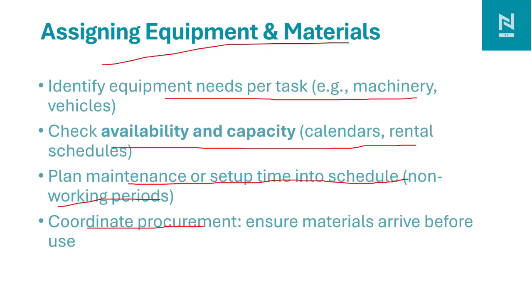We need to coordinate with procurement. Some materials may take time to arrive on site, and some may come from Asia, which may take 3 to 6 months. We need to make sure that we have the long lead time items in the schedule.